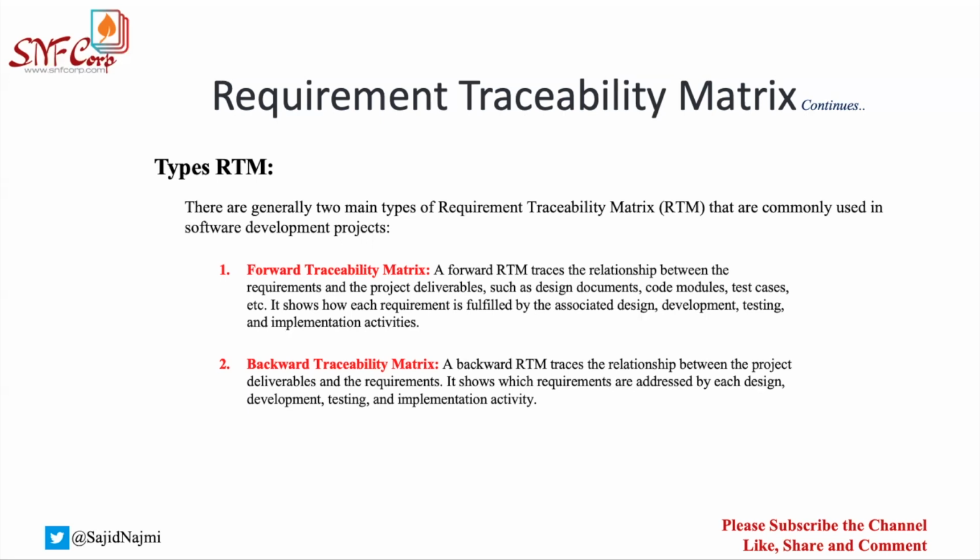During the requirement gathering, we create the BRD, right? When we create the BRD, at the same time we have to create the requirement traceability matrix. Yes, this will be starting from day one. The moment you start writing the requirements, you would want to start writing this RTM, because this is giving you the reference point of the requirement. So it is advisable for you to start from day one of the requirement.